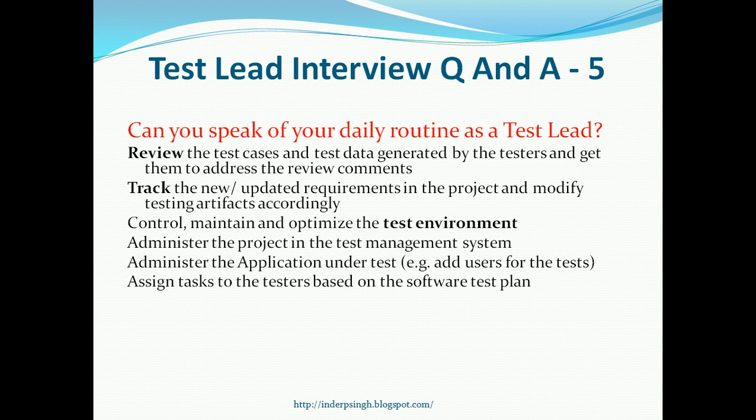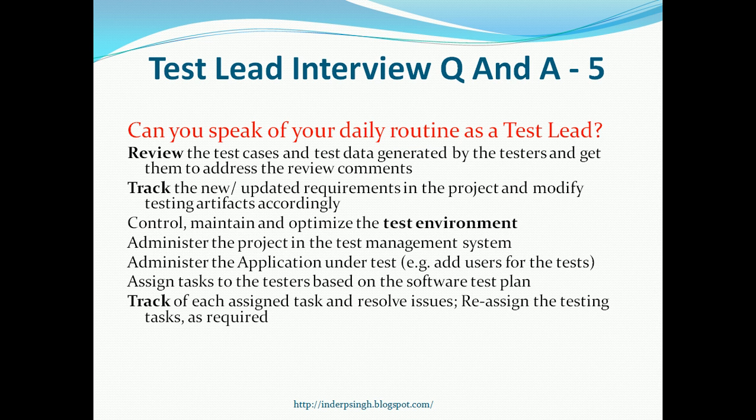Then on a daily basis, the test lead ensures that as per the schedule, the tasks are assigned to the testers, and they are on their task. If there are any delays, etc., the test lead resolves those issues, and sometimes the estimate may be off, so it may be required to reassign, redistribute the testing tasks.